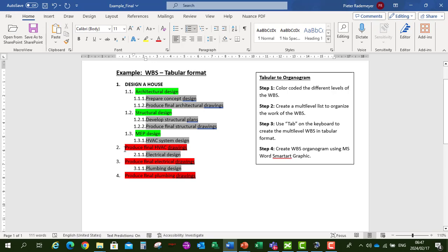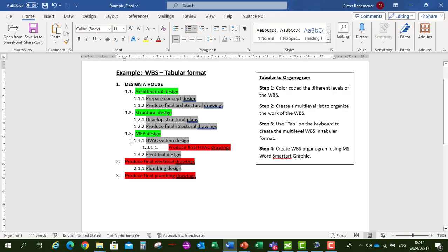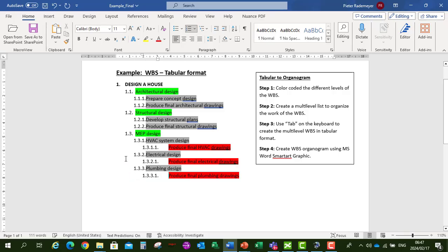Under HVAC, our third layer now is to produce our Final HVAC Drawings. Tab three times. Produce Final Electrical Drawings. Tab three times. And Produce Final Plumbing Drawings. Tab three times. So this is our Work Breakdown Structure now in Tabular format.